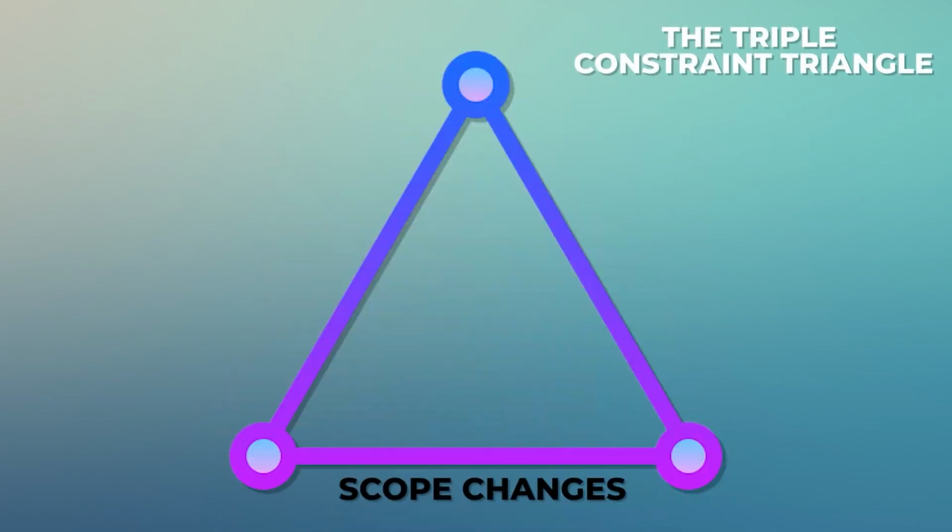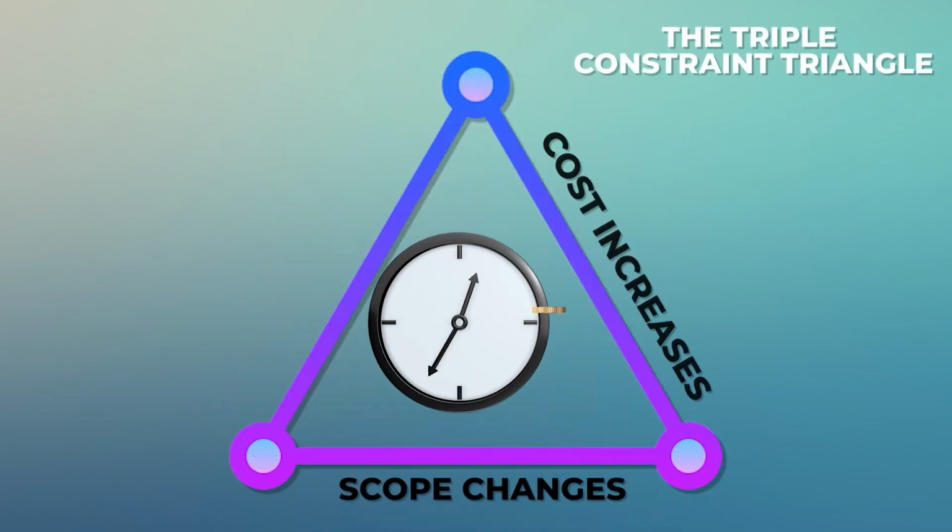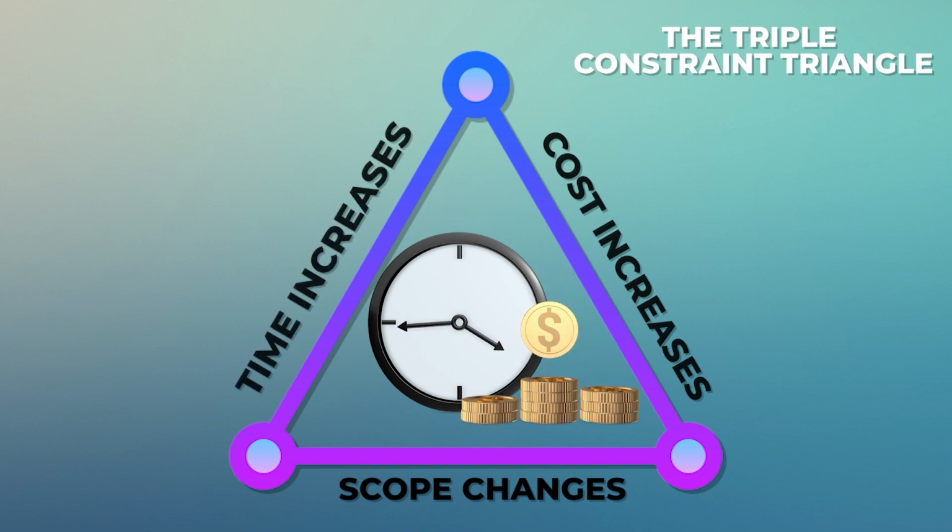But all this means my cost will increase. Second, my time will increase as well. I cannot just give it to them immediately. Or you know what? Another way of doing it, just call an Italian restaurant and get garlic bread from them. That's your triple constraint triangle. A change in one of the legs may impact at least one of the other two legs.